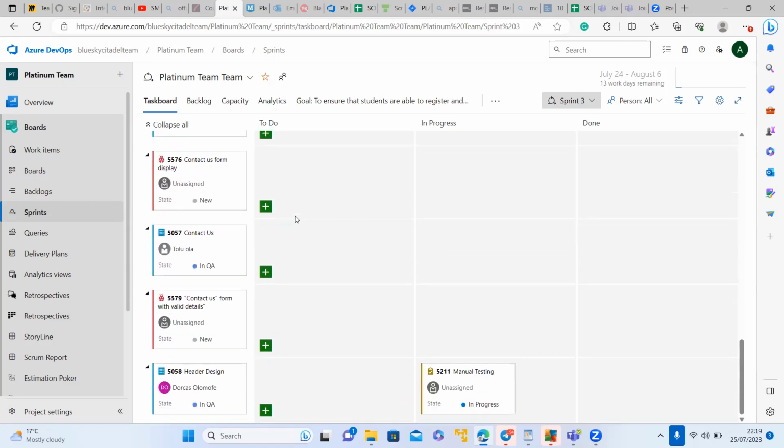okay, so you need to tell your developers, okay, so we have one task, but it's not estimated in hours. So you need to tell your developers and your QAs during your DSU tomorrow. Tell them they need to create their task and estimate it in hours against any story that they're working on. Sorry, the developers, we don't have access to the developers that easily, but we'll try. But the testers are all usually there. So your developers, if they don't come to the DSU, that's fine. They still work, isn't it? Even if they don't come to the DSU.